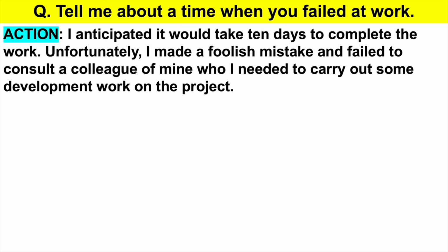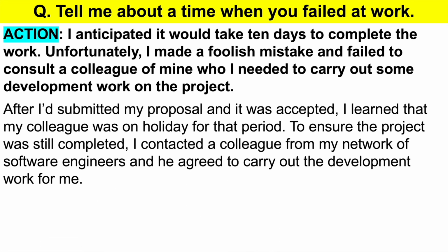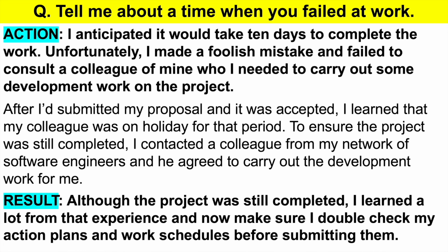Now, unfortunately, I made a foolish mistake and failed to consult a colleague of mine who I needed to carry out some development work on the project. After I'd submitted my proposal and it was accepted, I learned that my colleague was on holiday for that period. To ensure the project was still completed, I contacted a colleague from my network of software engineers and he agreed to carry out the development work for me. Now, although the project was still completed, I learned a tremendous amount from that experience and now make sure I double check my action plans and work schedules before submitting them.